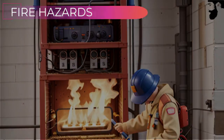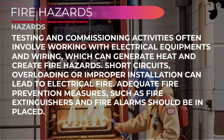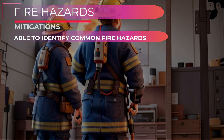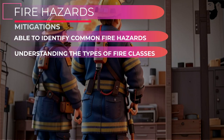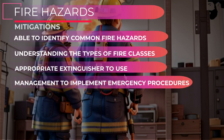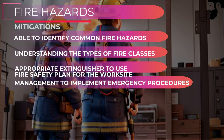Next, fire hazards. Testing and commissioning activities often involve working with electrical equipment and wiring, which can generate heat and create fire hazards. Short circuits, overloading, or improper installation can lead to electrical fires. Adequate fire prevention measures, such as fire extinguishers and fire alarms, should be in place. Personnel must be equipped in recognizing common fire hazards in electrical installations and understanding the types of fire classes and the appropriate extinguisher that should be used. Management should implement emergency evacuation procedures in the event of a fire and establish a fire safety plan for the worksite.